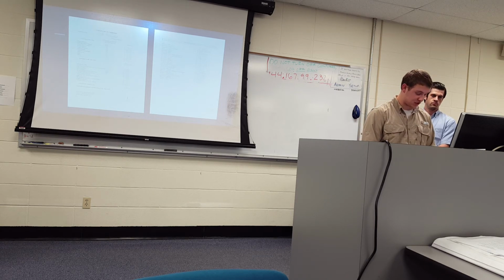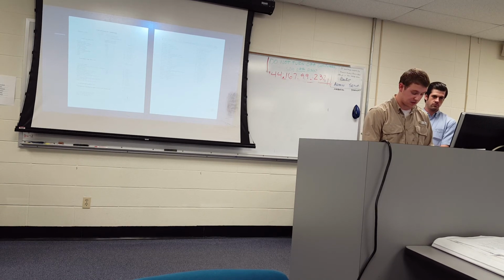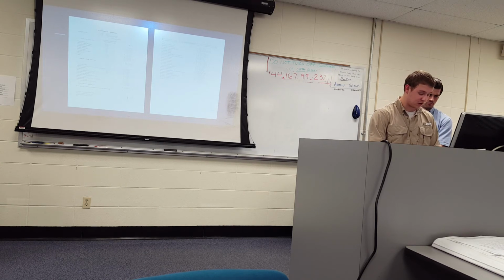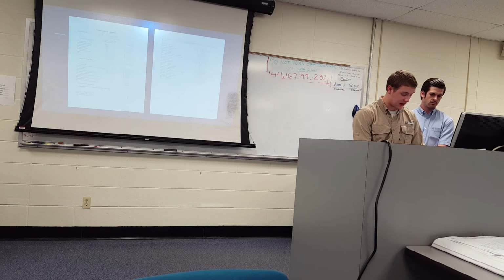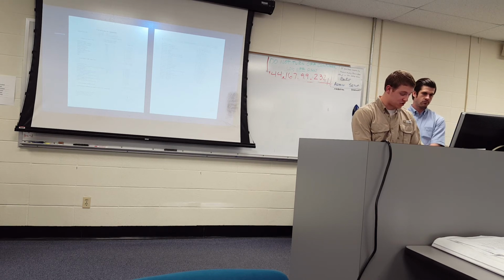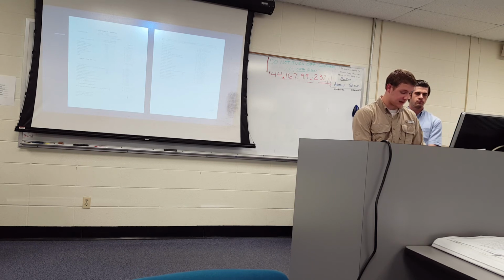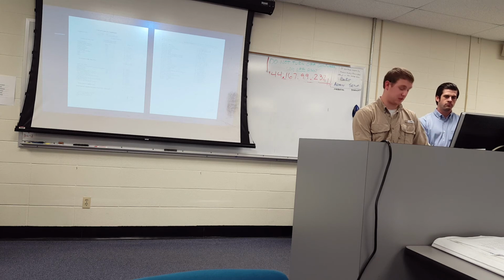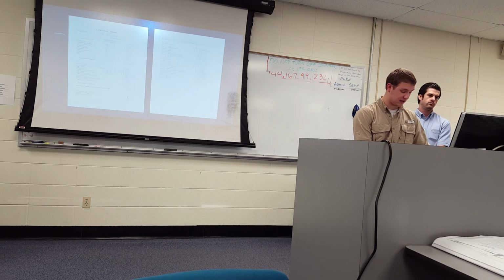Now our general conditions: our total general conditions cost is $49,750, and that includes all of our field office, temporary fire extinguishers, office furniture, supplies, postage, miscellaneous document printing, all of your office supplies, temporary fencing and signage, and equipment rentals that are necessary to complete the job. Our total general conditions, including on-site field office staff, is $231,750.